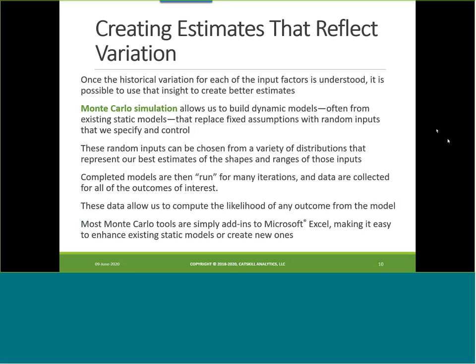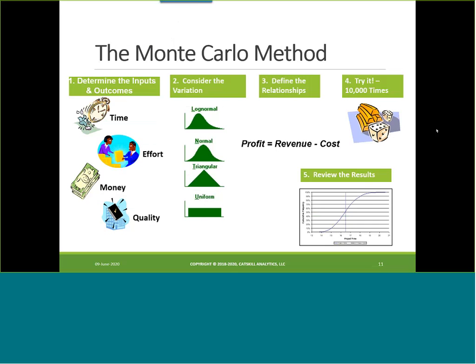As I said, most Monte Carlo tools are simply add-ins to Microsoft Excel. It makes it easy to enhance existing static models or create new ones. So here's a picture of the way the method flows. We start by determining the inputs and the outcomes. They may be time, effort, money, quality, any number of things. Basically, if you're estimating it today with a static approach, you can estimate it tomorrow with a dynamic approach.